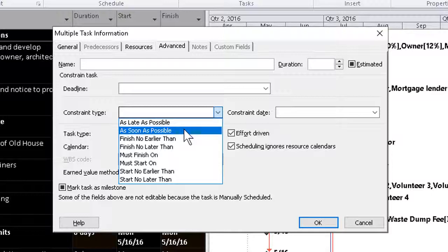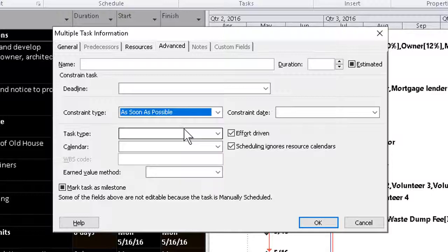We're scheduling from the start date of the project, because we know that with all the tasks selected, it'll set them all back to as soon as possible, and we don't know that any constraints will be otherwise next time. The important thing is we now have a consistent starting point on our constraints.